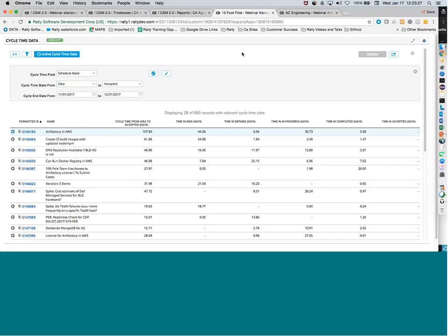So if you're over capacity, you can start looking at, well, is there another member of the team? Maybe Dudley is a testing resource, and he's shared across multiple teams, has a lot of testing work to do. Well, this is a good time to get that kind of cross-functional team working. Someone else on the team, could they possibly take on some of that testing work?